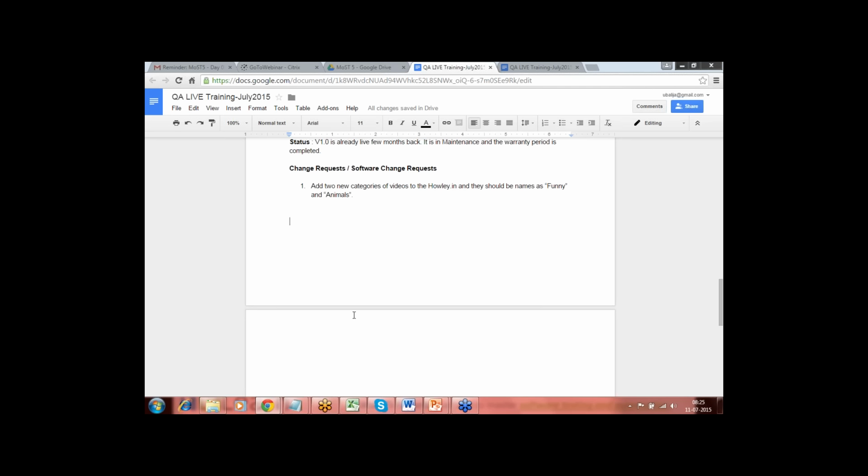So what we need to do in the current situation is add that first. Let's say for now we think these are the two hot topics, animals and funny. So we wanted to go ahead with these as soon as possible, maybe in 15 days from now, 20 days from now. So we try to do it in short cycles, where the short cycles could be like 4 weeks. Within the 4 weeks, we wanted to complete all the things: requirements, design, coding, testing, everything.